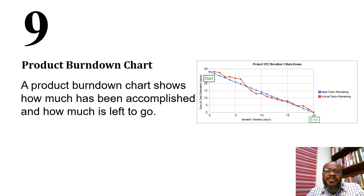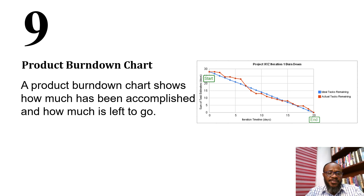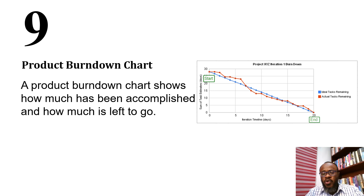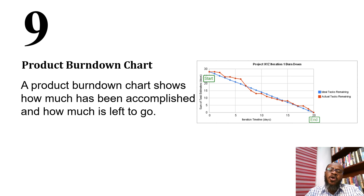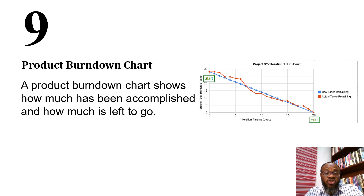A very important chart in agile development is the burndown chart. A burndown chart shows how much work has been accomplished and how much is left to go. It looks at time versus scope, so we know whether we are ahead of schedule, behind schedule, or on track.